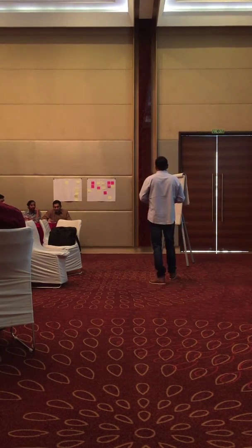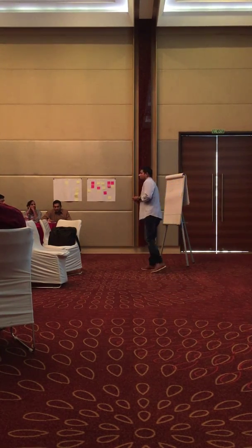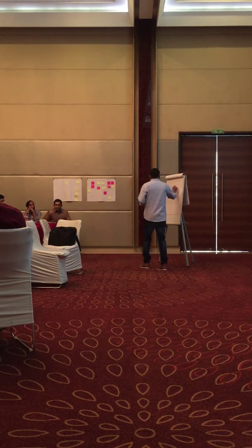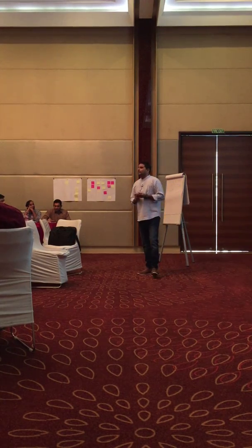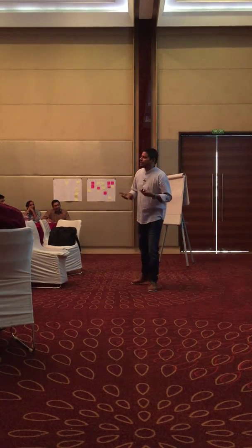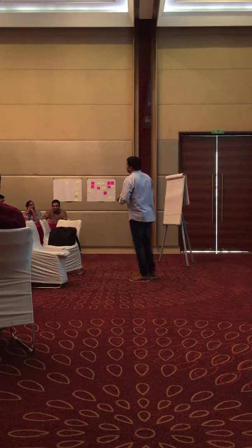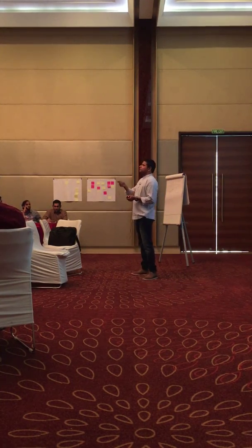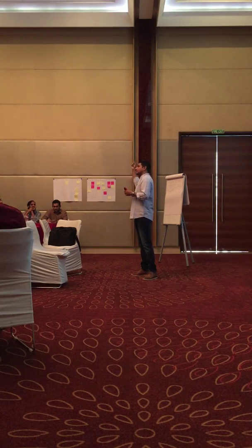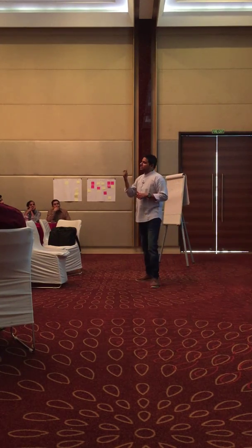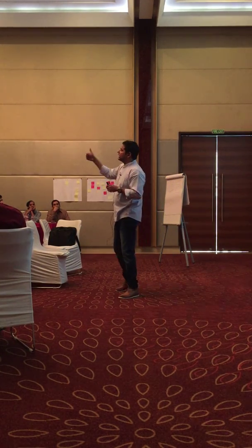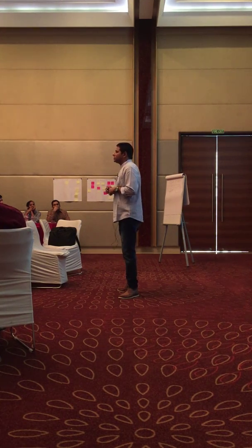In the olden days when a team was working in XP mode, they used to write the requirement on a small post-it, and the product owner and the development team would discuss and identify the acceptance criteria, all these things. When the development team picks it up for sprint implementation, the product owner hands it over to the development team. After they develop it, in the review stage, they give the same thing back to the product owner, which already has the acceptance test criteria written. He will test it and say, okay, yes, I'm accepting it. Right? So that is the user story.